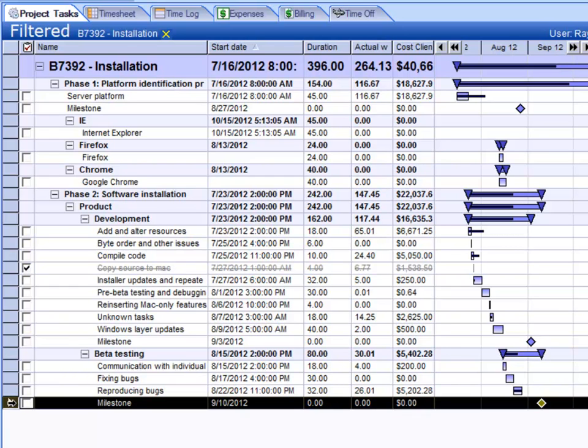If you're blowing half your milestones, then you probably want to sit down with your team and figure out why. It's perfectly natural to go past schedules, but it's also nice to figure out why that is and to insert tasks to account for that extra time that you're spending.